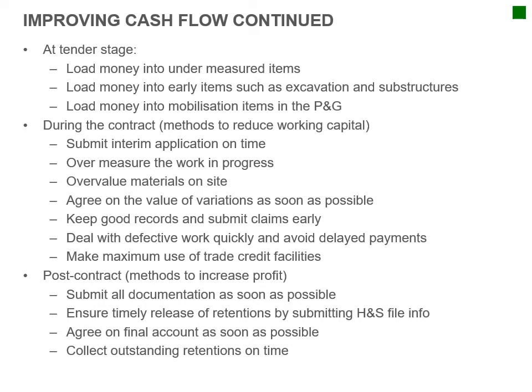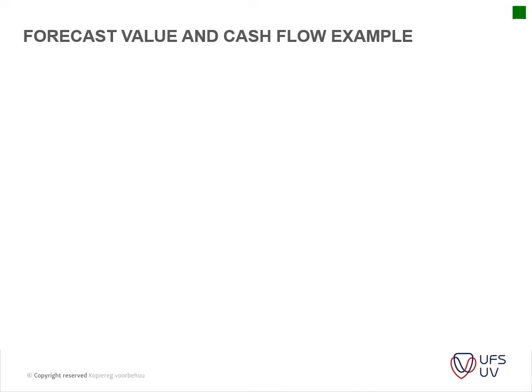Post-contract is submit all the documentation as soon as possible, ensure timely release of retentions by submitting health and safety file, etc. Agree on final account as soon as possible and collect outstanding retentions on time. Okay, so we've dealt with a couple of these in the previous chapter, but please make sure this is a very important slide for me. You will have to be able to discuss this. Okay, then forecast value and cash flow examples.